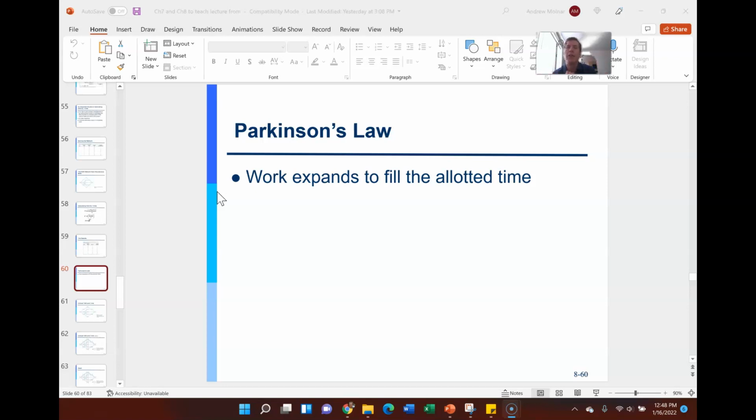That's Parkinson's law. The other thing to watch out for when it comes to schedule management is student syndrome, right? What do students do? Hey, no offense meant to you guys. You'll wait till the last minute, do an all-nighter, and get the report done. Excuse me. So that's called student syndrome, and sometimes your activity owners will do that too.